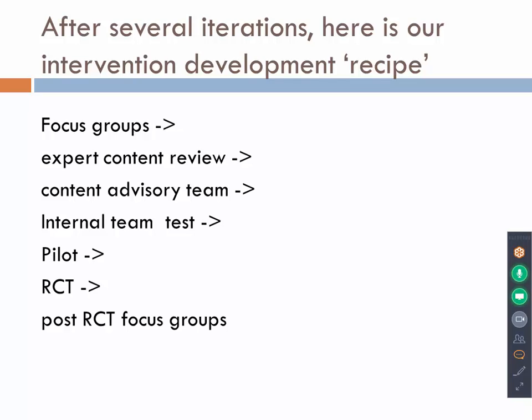So before you've spent a ton of money developing it, do a wireframe, get some kids together, or adults depending on your population, and ask them what they think about what's on the page, what they think about the flow across, and really get some feedback in terms of the usability and understandability of your intervention. And then, as we talked about, do an internal test.